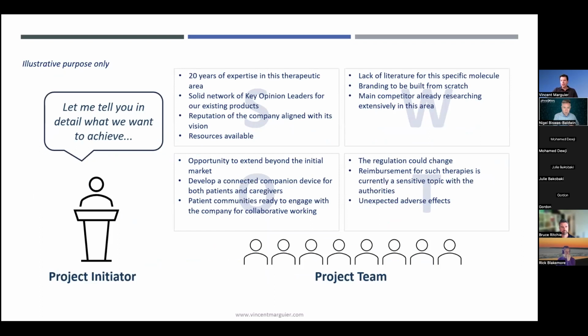So how to apply SWOT? I do it like a small team building exercise, really, which may serve as an appetizer for what follows. Once the team understood the SWOT principles, ask the person who initiated the project, either the project sponsor or the mandate, to tell the team what the project is all about, what the expected delivery and outcome should be, whether in terms of benefits, revenue, story, experience, what have you, the expected timelines, the available budgets, all in, details, but just like telling a story.